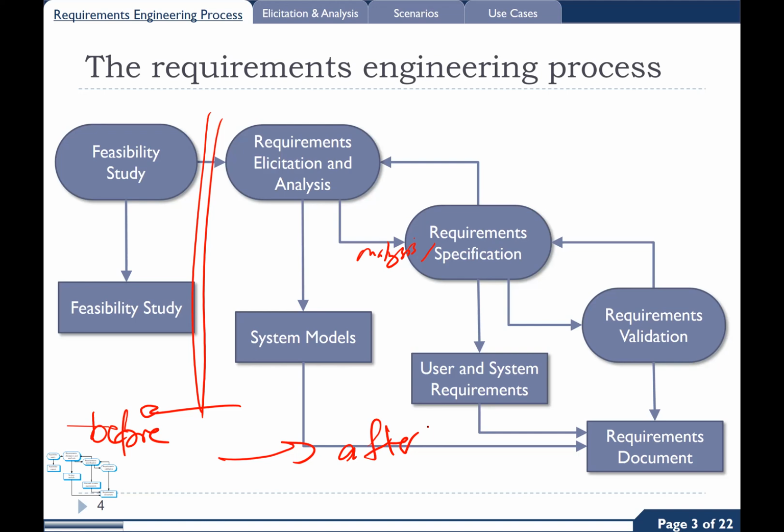So a feasibility study has got to be quick and dirty, maybe a couple of weeks, no more than that. There are some companies that specialize in conducting feasibility studies, so you can get consultants in and they do the feasibility study on your behalf. And the reason it's got to be quick is that if you spend 8 months doing it, you realize this is not a good project to do, but you already spent 8 months of work coming to this realization. And the things that you check for in a feasibility study is, do I have enough resources for it, with all of its flavors.